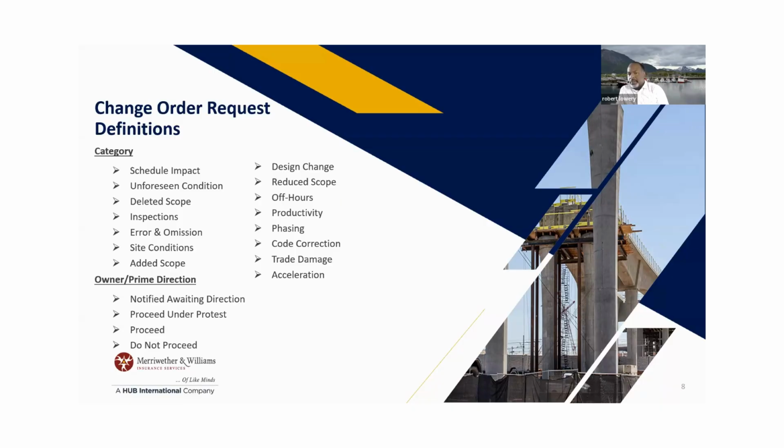So when you're doing your schedule, you have to account for A, putting together these shop drawing submittals, B, the review, C, if it comes back to you, you need to make corrections. That could be some more time in there. And then giving it to your manufacturers to put it in their production schedule.